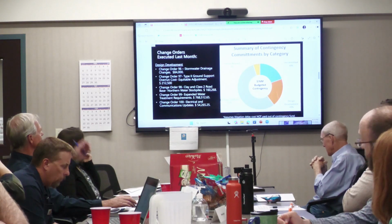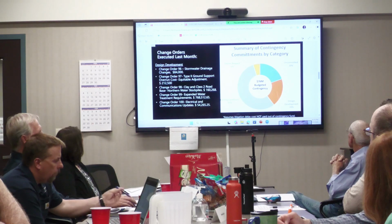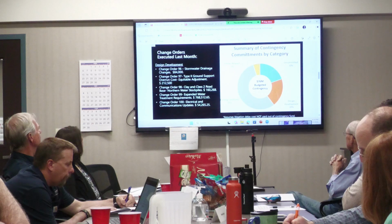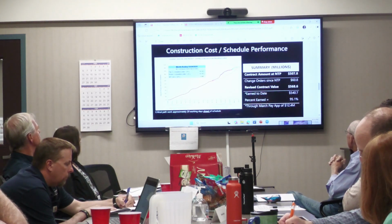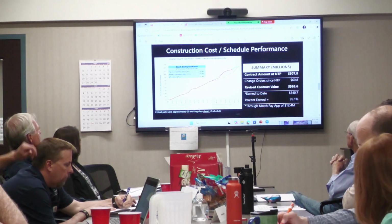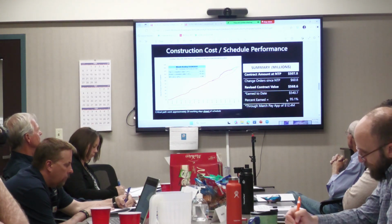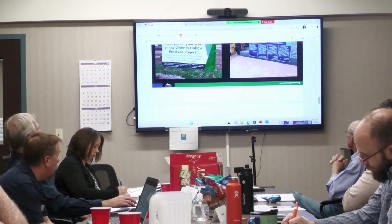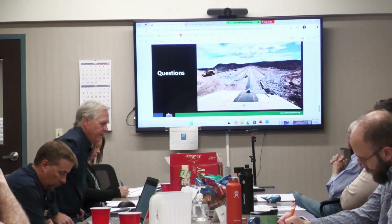As far as the budget, we still have about 20% of the revised contingency available. So it's looking really good for being able to come in on time and on budget. This is where we are right now. As you can see, we're getting very close and we're on schedule. 95% of the project is completed and paid out, so that's really good. That's really all we have on the construction itself.